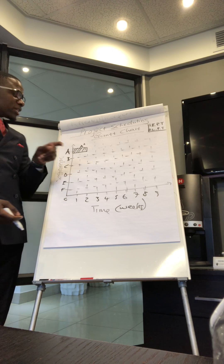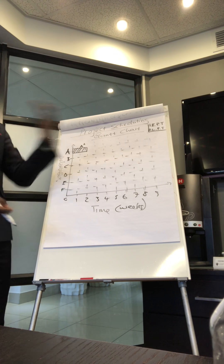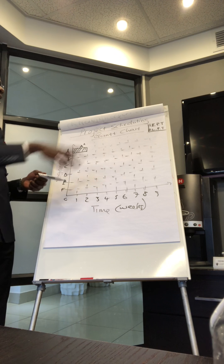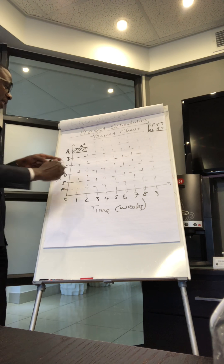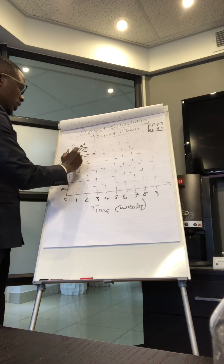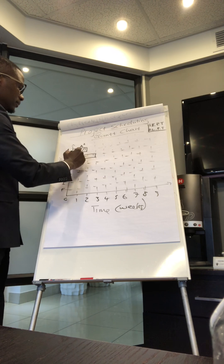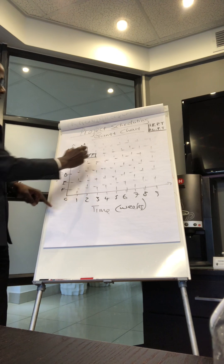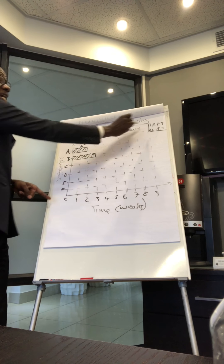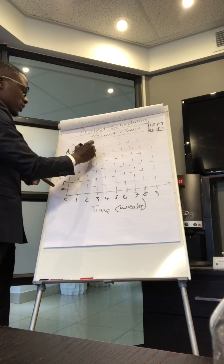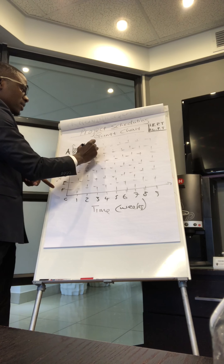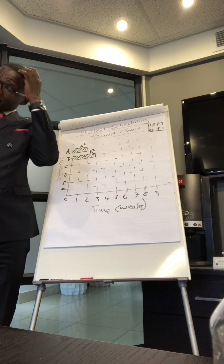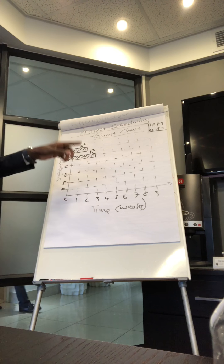Then we have Activity B, which also does not depend on any activity for it to start, and takes three weeks. Remember, a Gantt chart is a bar graph. We draw three weeks — it doesn't depend on anything so it starts at the earliest possible time, which is zero. We call this Activity B taking three weeks.